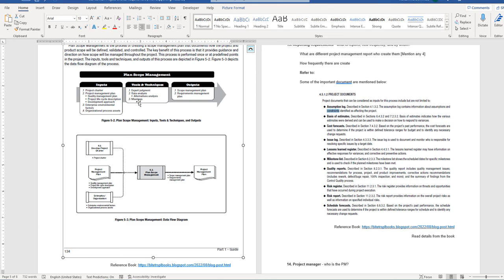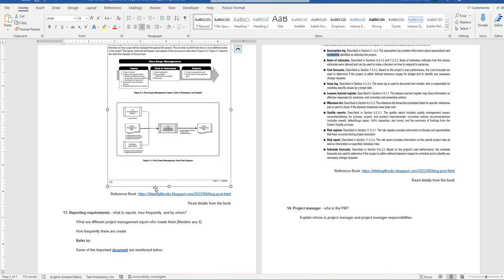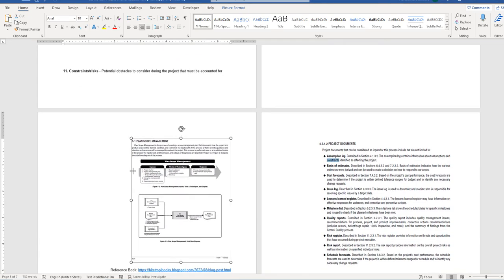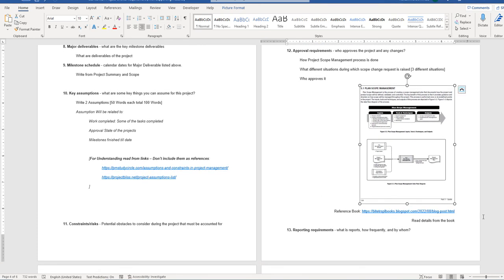That will be evaluated, then a decision will be made by the sponsors. This is the process business organizations usually follow while handling scope change. First, they identify the scope. Next, they review the scope for its benefits and its impact on the project, and finally they make a decision on it.